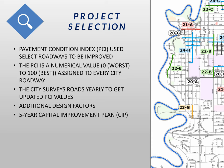We also take into consideration additional factors including the age of the street, how it was constructed, and whether any utility repairs are needed on the sanitary sewer or storm sewer, and whether our street work can be coordinated with other utility companies such as MPS and Xcel. One of the ways we use our money most efficiently is by performing major maintenance at critical points during the life of the street — specifically when we're able to perform what's called a mill and overlay.